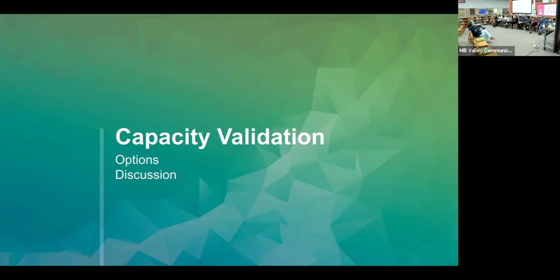Essentially DTSC will give you a green light that they're okay with everything in the CEQA document. We've incorporated public comments, essentially saying we've reviewed all the information, we've reviewed your proposed project, you've addressed or we've reviewed all the alternatives. We're okay with that document. The last step, essentially a ratification of that document, will be made by the Board of Trustees. So essentially, the district is the lead agency in that case that will implement the CEQA document.